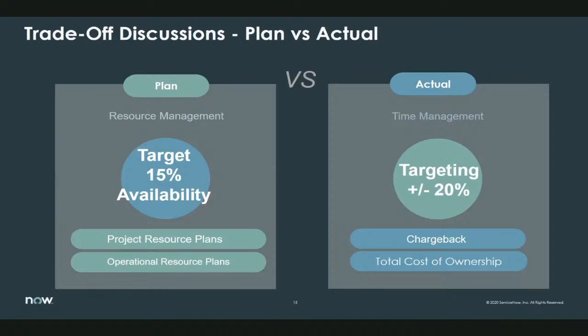At Western and Southern, we also use time cards and the time tracking module, which gives us actuals. I mentioned earlier that our IT department is a shared service and our time is billable. We have 3 different basic rates in our IT department, a high rate, a low rate, and then a 0, which translates into an infrastructure charge. This allows us to send a chargeback file to accounting to bill for IT services.